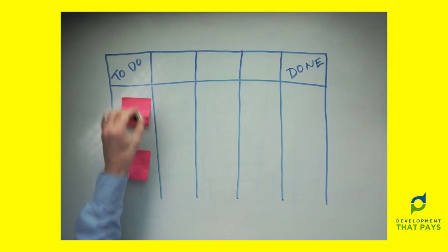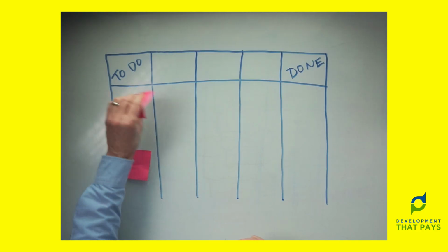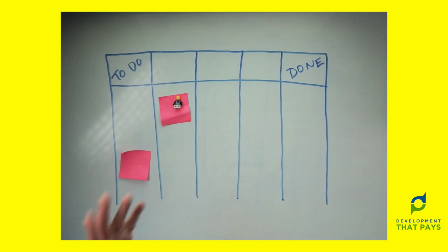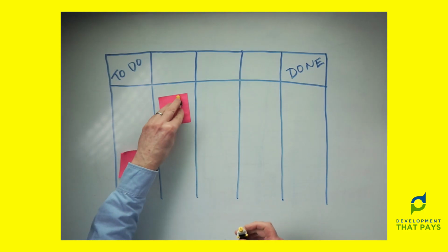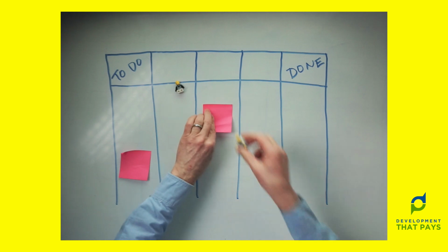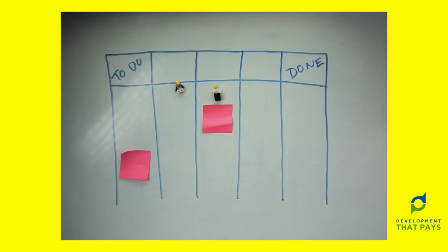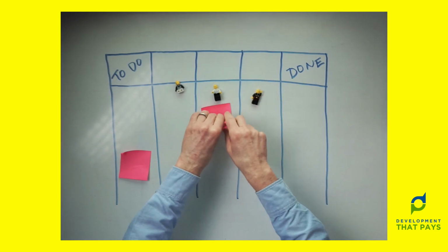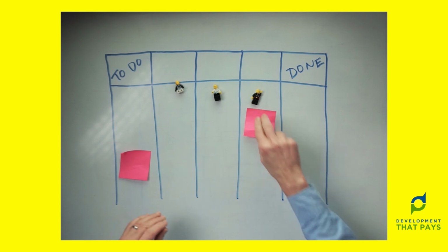However, oops, that person shouldn't have been there. I assigned someone early. Shouldn't be assigned at this point. If, however, this person picks up the ticket, assigns himself or herself to it, and then passes on to someone else, then it looks like we need 2 columns. And I'm sure you can see where this is going. If this person then passes on to another person, then 3 columns is the right number.